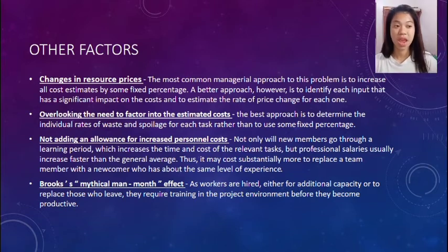And there is the behavioral possibility that, in the excitement to get a project approved or to win a bid, or perhaps even due to pressure from upper management, the project cost estimator gives a more optimistic picture than reality warrants. Inevitably, the estimate understates the cost. There is a clear violation of the PMI's code of ethics. It is also stupid. When the project is finally executed, the actual cost results in a project that misses its profit goals or, worse, fails to make a profit at all. Hardly a welcome entry on the estimator's resume.